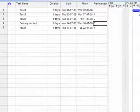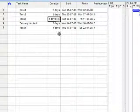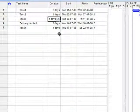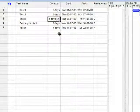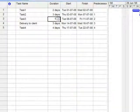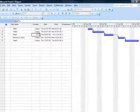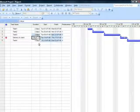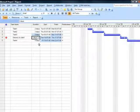Now for some reason, task 3 of mine which was originally scheduled to take 4 days is now taking 5 days. So I change the duration from 4 to 5. Obviously, delivery to client will also get delayed by 5 days in that case.